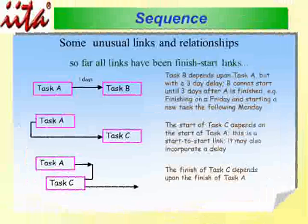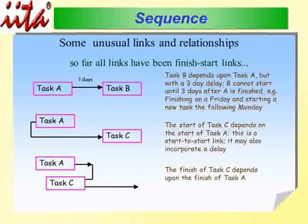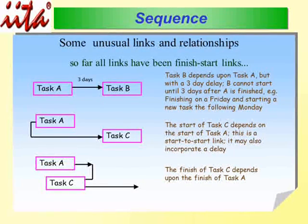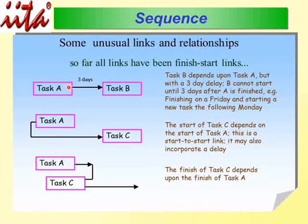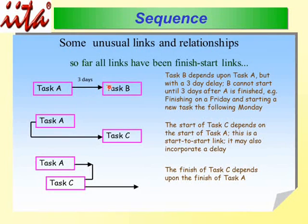We are going to continue with what we introduced in Part 1. It's about sequencing of tasks. The most important type of sequencing is called Finish-to-Start. In this example, task A starts and ends, and then task B takes off, but there is a 3-day lag. If task A finishes on Friday, with no work on Saturday or Sunday, task B will start on the third day.